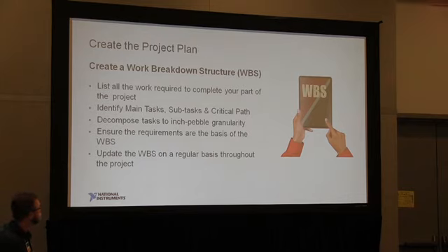You want to decompose these tasks, as I mentioned earlier, to inch-pebble granularity. What I mean is breaking down those big rocks into smaller pieces. So you've got a software driver you're going to write: develop the code and test it out, peer review, documentation, all those pieces that go into that. Maybe you're planning the sheet metal for the physical part of your test system, and so what drawings and what hardware do you have to have in place to support the sheet metal schedule, ready for when you're ready to fabricate and assemble the whole system.